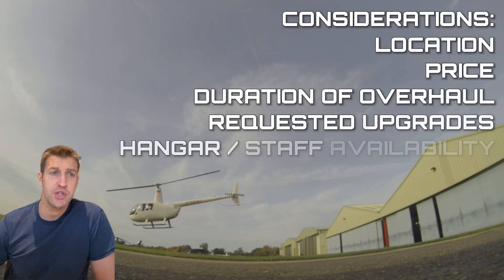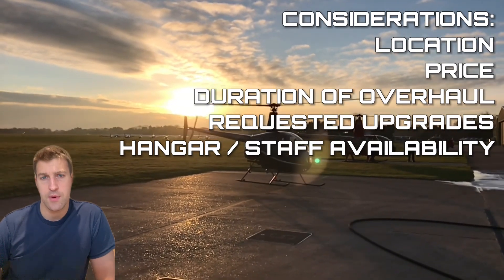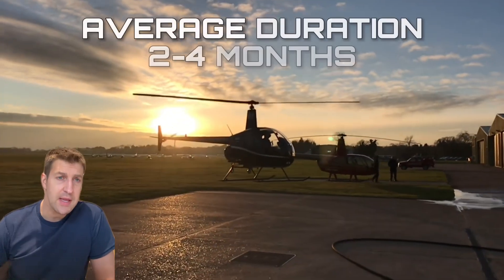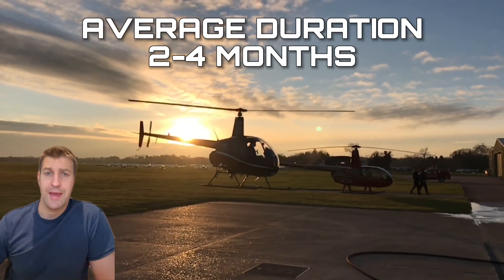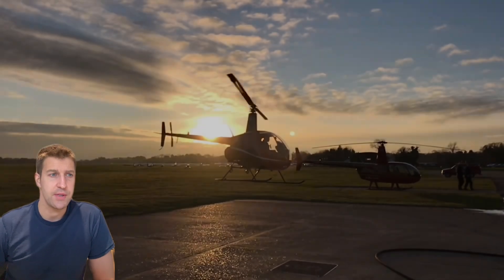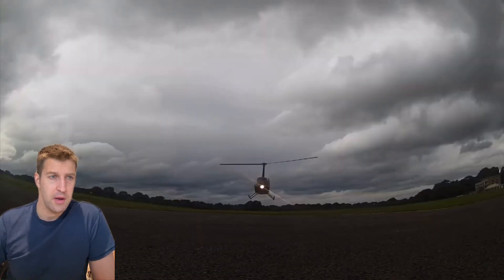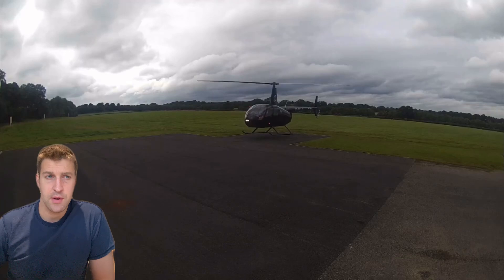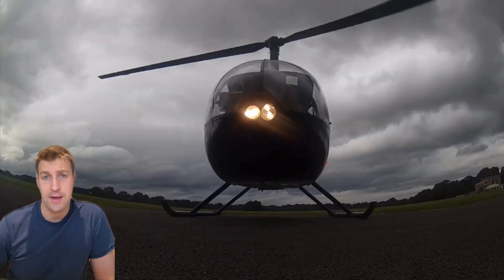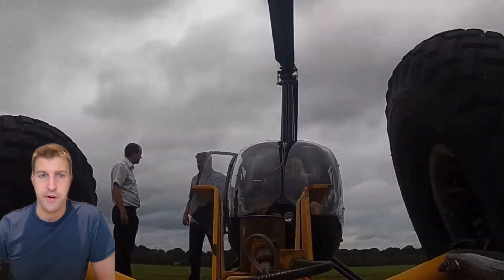There may well be cost advantages to choosing a service centre instead of sending back to the factory. Location, price, duration and slot availability all factor into selecting where to send the helicopter for overhaul. Average overhaul durations are around two to four months, but combined with the kit lead time, this needs to be scheduled at least six months in advance. The video currently showing is of an R44 being overhauled at Heliserv, a Robinson-approved service centre specialising in overhauls, located in Leeds in the United Kingdom.